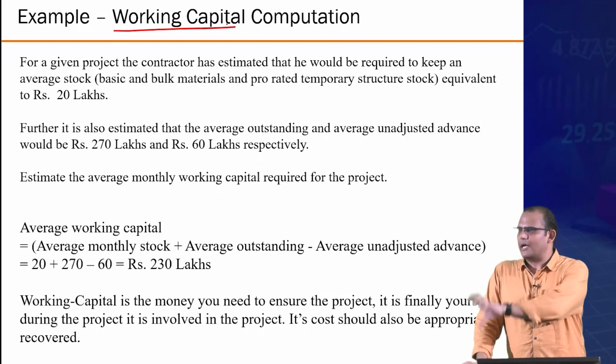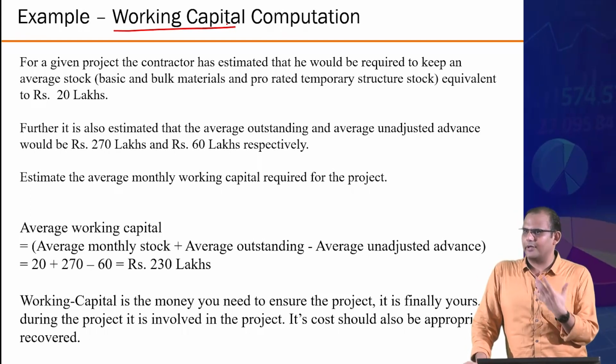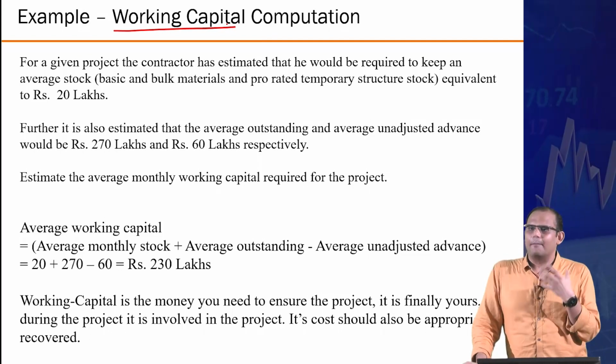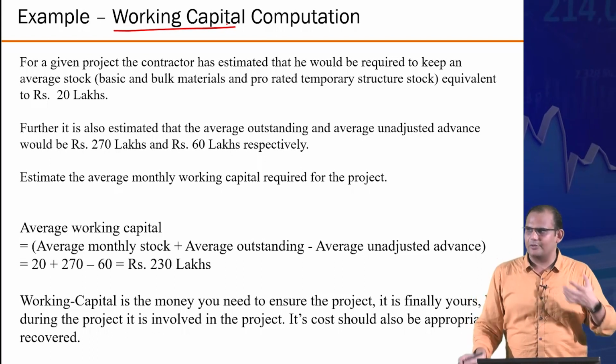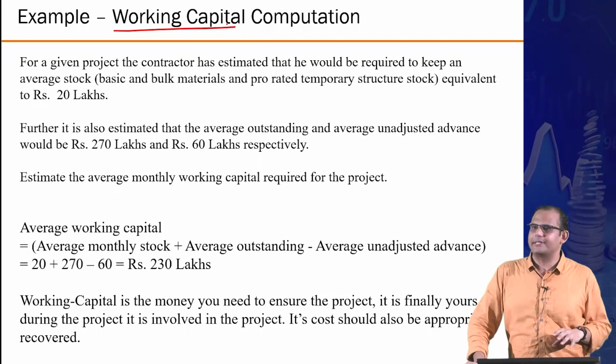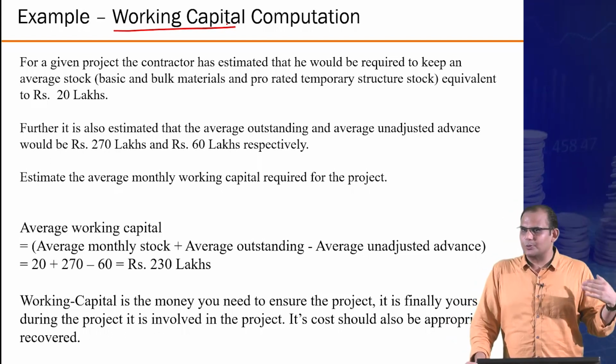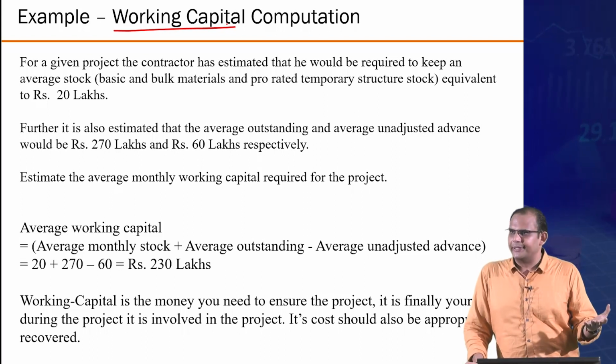Finally, you take this money out. This is not a cost. You do get this money. But while executing the project, you need to have this extra cash in hand to manage the project. Because what happens is, you have to pay sooner than what you get paid for, right?